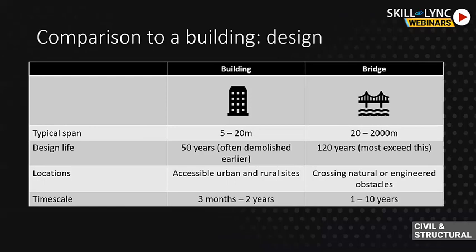In terms of typical locations: buildings are built in typically urban sites. For buildings, you deliver them in small pieces and install level by level. In bridges, crossing natural obstacles and how to get there is quite a different challenge. There are various techniques that are utilised that I'll touch on later. It's a much more complicated challenge requiring specialist contractors and specialist equipment. And the time scale of the project — for a big bridge — involves a lot of lead time in development, design, and construction.